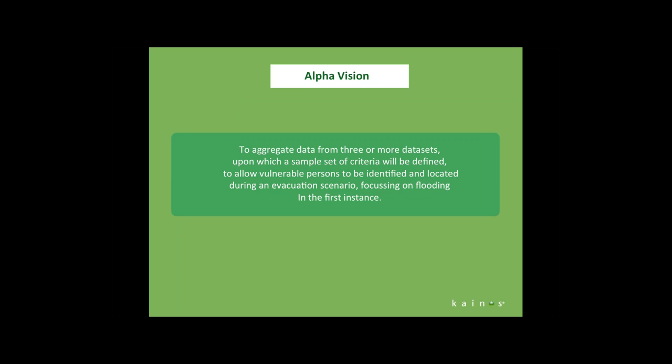The first step for us in delivering an alpha is to determine the actual vision. We agree on a vision statement written in conjunction with the customer. The vision for the Surrey County Council vulnerable persons analytics alpha was to aggregate data from three or more data sets, upon which we would define a sample set of criteria to allow vulnerable persons to be identified and located during an evacuation scenario, focusing on flooding in the first instance. This vision statement goes prominently on the whiteboard in the development room, focusing us on what data we need and how to achieve this within the evacuation scenario constraints.